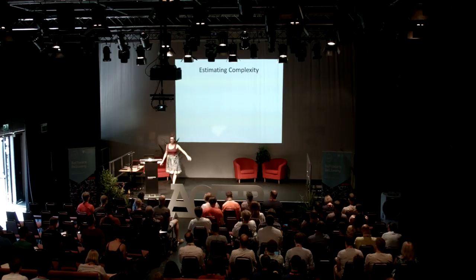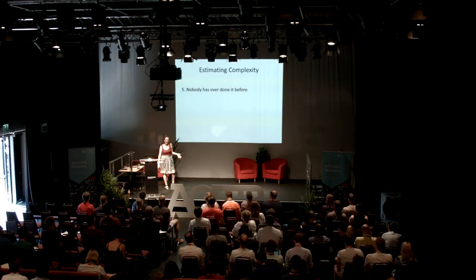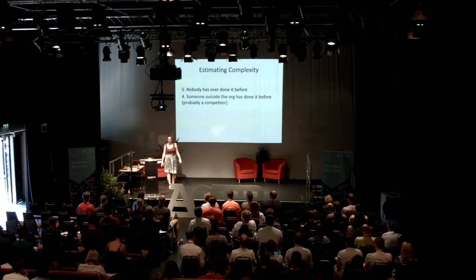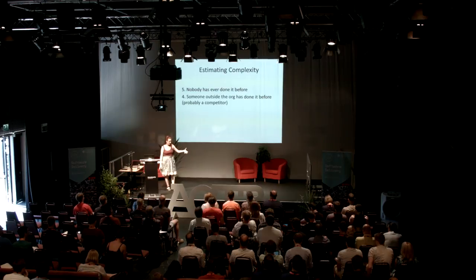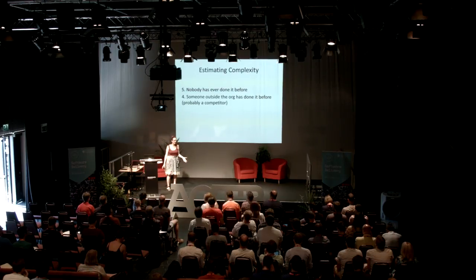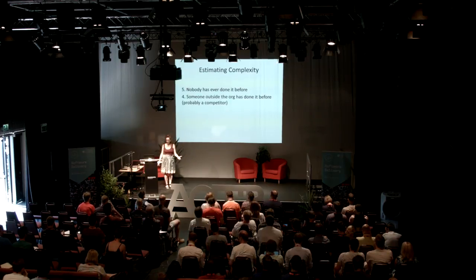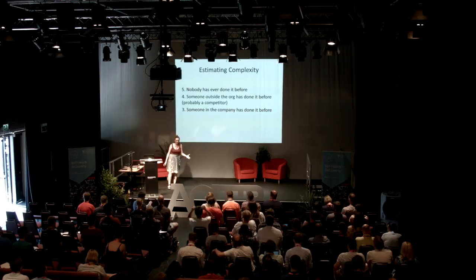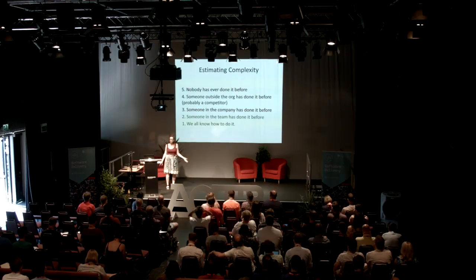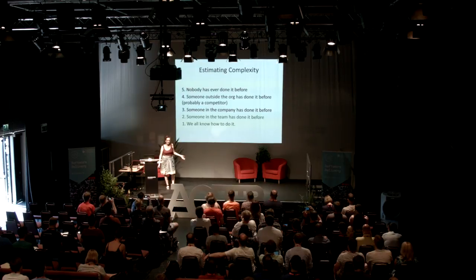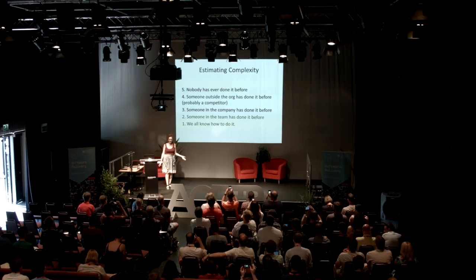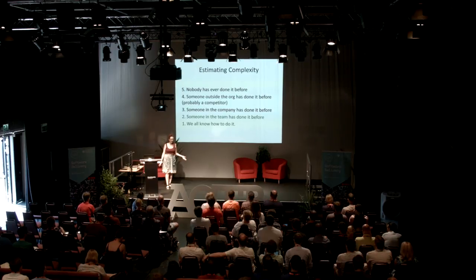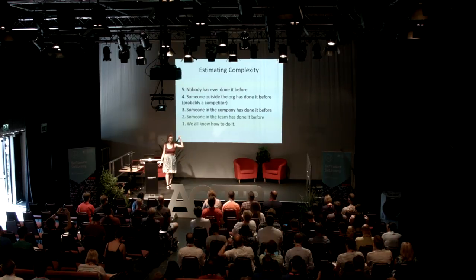I use this little scale to help estimate where we are on that Cynefin framework. I ask: who in the world has ever done this before? Five: nobody in the world's ever done this before — might not work at all. Four: somebody outside the organisation has done it but not here — we have no access to expertise, we have to treat it as complex. Three: someone in the org has done it before, or we have access to expertise — we can learn it from a book or YouTube. Two: someone in the team has done it before. One: we all know how to do it. Those fives and fours are complex — high discovery, that's where the risk is.